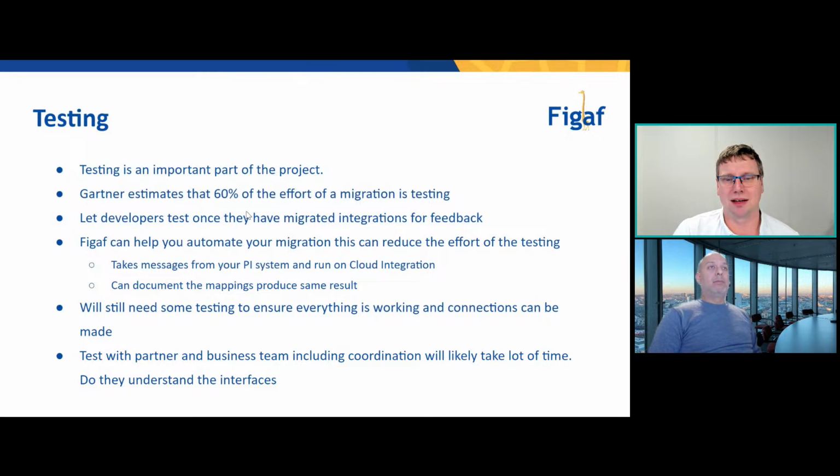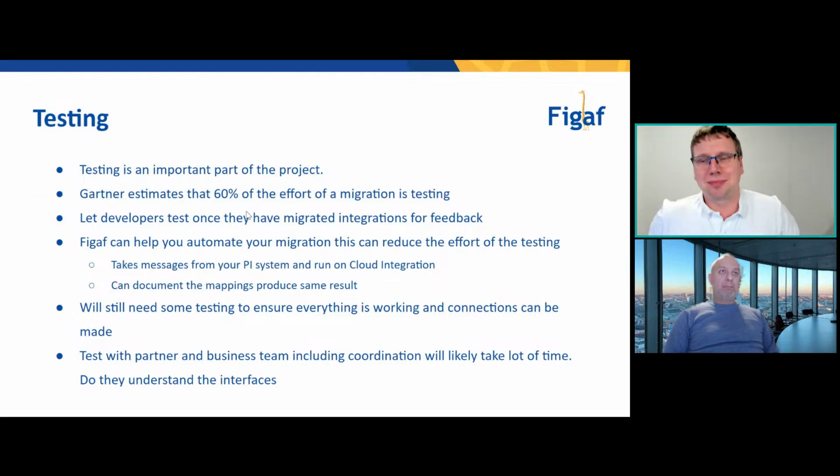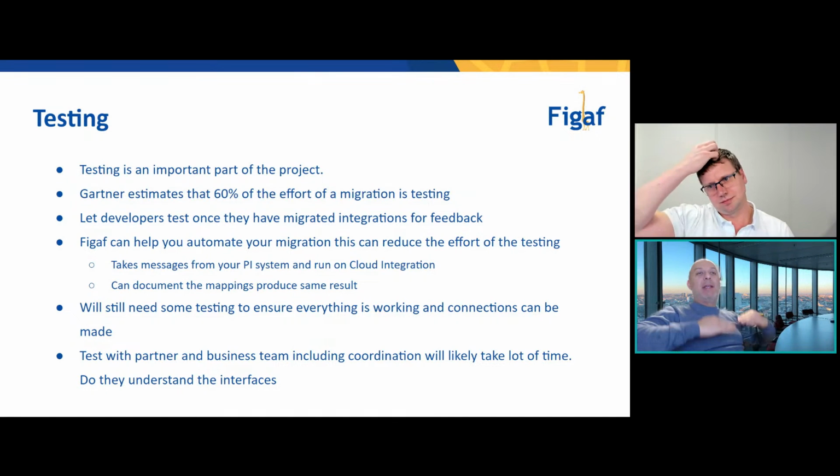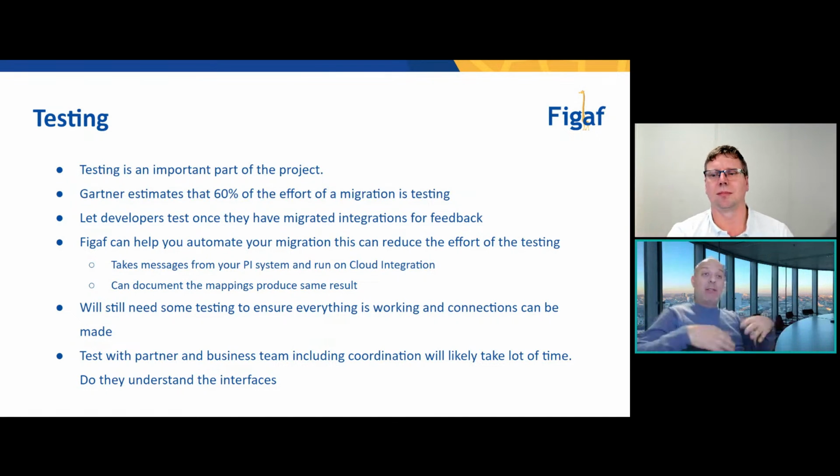Yeah, Gartner estimated that 60% is spent on testing, and I think that's probably correct. We had a talk about this, about giving developers access to test earlier in the process, right, Juan? Yeah, I think there's two reasons why testing effort takes so much, right? I think that we come from architecture and system engineering culture in which we do a very linear unit testing, system integration testing, validation testing in the regulated industries, for example, validating the interfaces.